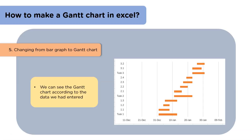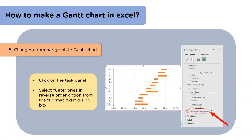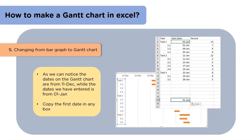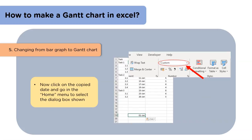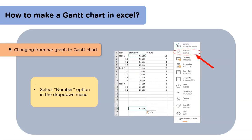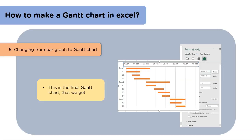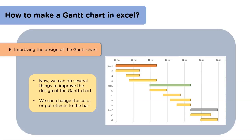We can see the tasks on the left side are in reverse order. So we will click on the task panel, then go to the Format Axis dialog box and select the Categories in Reverse Order option. Now we can find our tasks in the right order. One more thing we can notice is the Gantt chart is starting with some other date and not with the dates we entered. For this, we will copy the first date into another cell, then go to the home menu to select the dialog box, and in the drop-down menu select the Number option. We can find a value displayed in the copied cell. We will copy that value, click on the dates on the chart, and as the Format Axis dialog box opens, paste that value in the Minimum box. As a result, we will have our final Gantt chart on the screen. In the last step, we can give several designs to the Gantt chart, change colors, and make it more presentable.